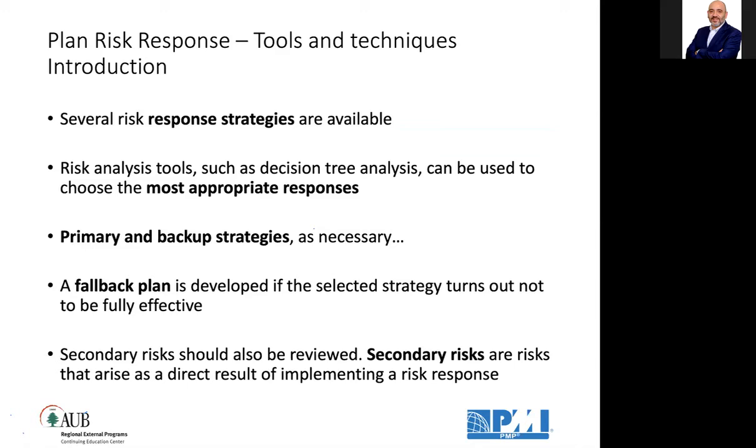Let's say our servers could be struck by lightning and data will be lost. This is a risk. If data is lost, we will go get backup tapes from another location and restore the data. Okay, this is the risk response. But what if, during the route, while bringing the tapes from Achrafieh to Hamra, there is an accident and the tapes burn?